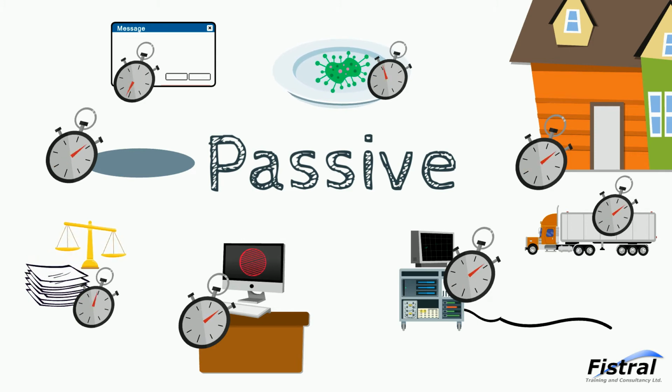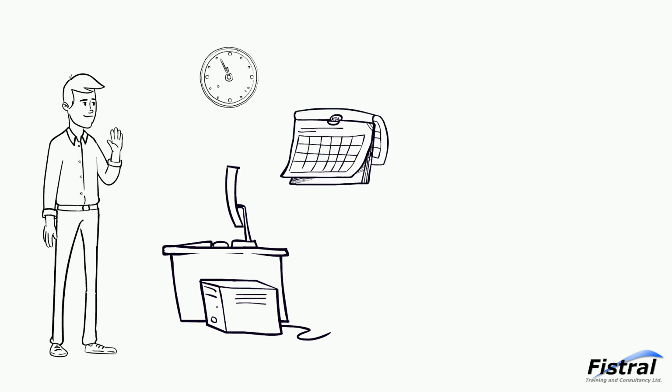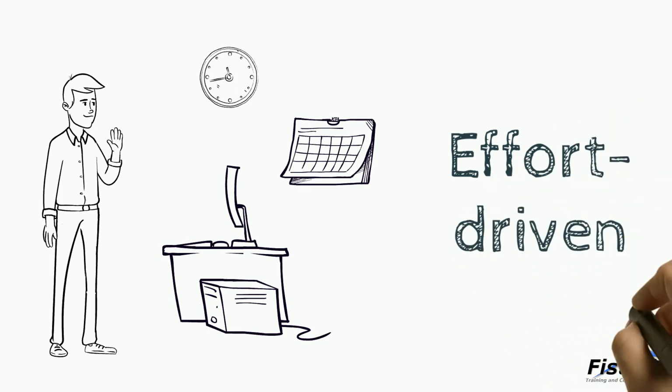And it might be fairly obvious, but it's so easy to overlook these waiting activities because we've all been taught to focus on the actions, the doing tasks. Another thing you need to consider is how you schedule the different types of tasks. For an active task that I'm doing, I would typically schedule that during my normal working hours. So let's just say 9 to 5, Monday to Friday. It's scheduled around the amount of effort that the human resource puts into it. So we call them effort-driven tasks.